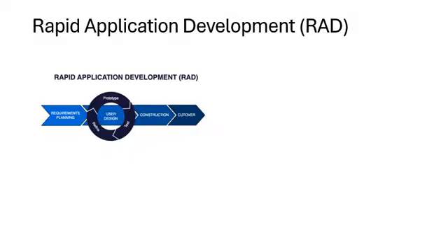Despite that, rapid application development can be a good option for a project with a smaller scope and limited documentation, and it has many limitations. It lacks scalability, so it is most suited for a small to medium sized project and not good for a big project. In rapid application development, delivery can be quick, but it can be quite challenging or impossible if the clients are unavailable at critical decision making times, as it can affect the delivery times of the project. Why is rapid application development not a good choice for my project?